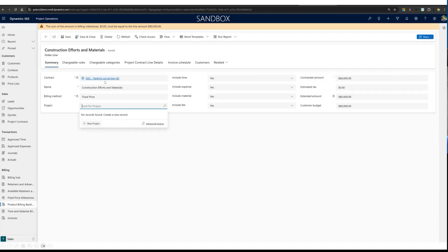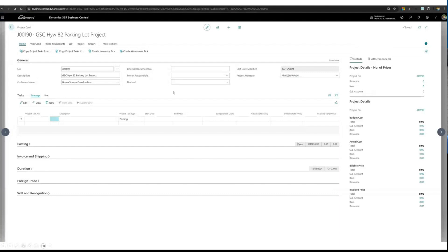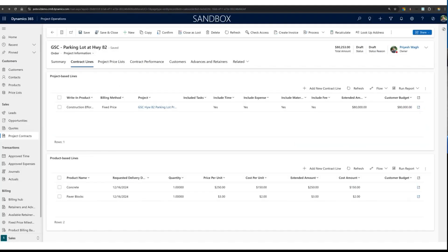On the order line, I've added some estimates and I'll create a project. By clicking 'New Project,' I fill out all the project details and save and close. When you create a project here, it goes over to Business Central as a project header. I've also completed the fixed price order lines and added materials — concrete and paper blocks — to be used on this project.